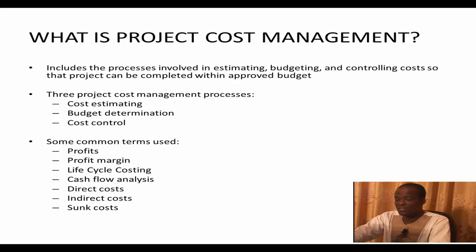Then we have life cycle costing, which is very important, because as a project manager you don't just look at how much it costs to carry out the project, but also how much it's going to cost the client after the project has been handed over to him, how much it's going to cost to maintain, among others.